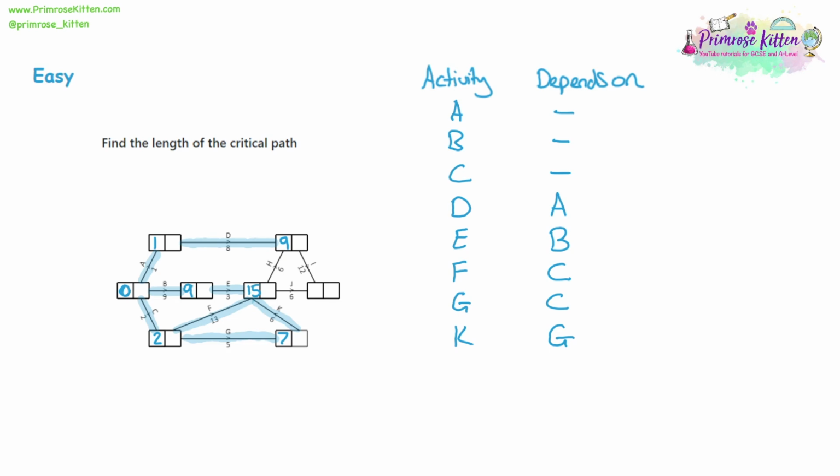Now you'll notice we've got most of the diagram filled in. And what we could do here is that we could say we've got J, which is 6. 15 plus 6 is 21. J depends on E happening, and K and F. So notice there's 3 arrows going into the box with 15. So it depends on 3 things. So we could say, well, job done. We've got the critical path, 21. Write down the answer and finish.